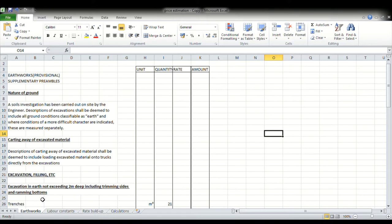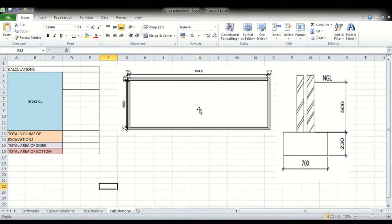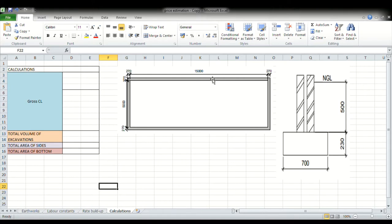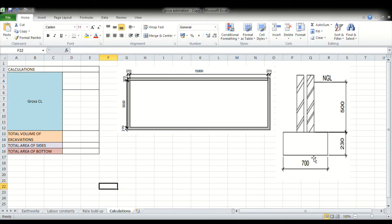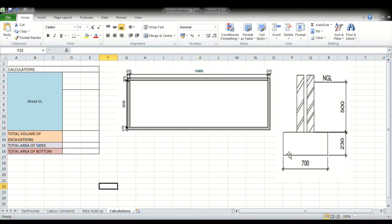These are the drawings that we are working with. Basically they form part of the tender documents that you have received. I made it very simple so that we can easily work out our dimensions and easily know where what is coming from. So that is our plan view, and then this is the detail for our foundation. We can see there that our excavation depth is 730, and then our concrete, or the width of our excavations, is 700. And then here we have the plan, it's 15,540 by 5,540.